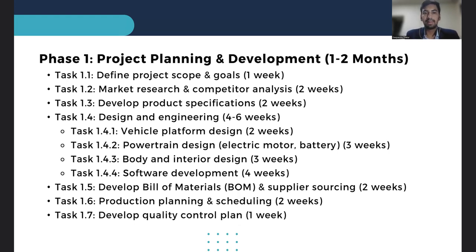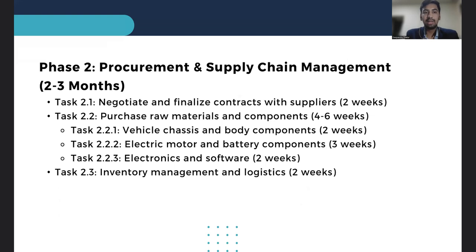The first phase — project planning and development — lasts one to two months. Here the project team defines goals, researches the market, and designs the vehicle, including the powertrain, body, software, and interior. They also identify suppliers and establish a production schedule with quality control in mind.